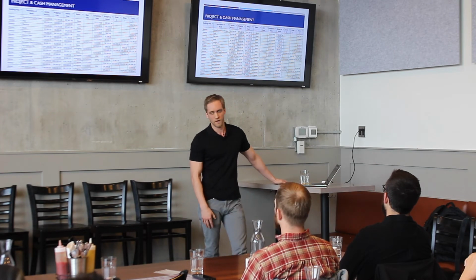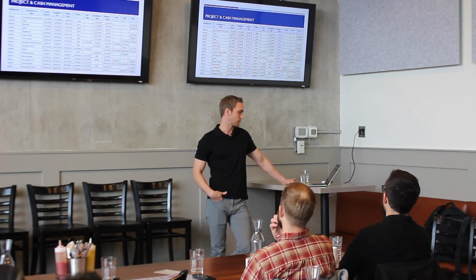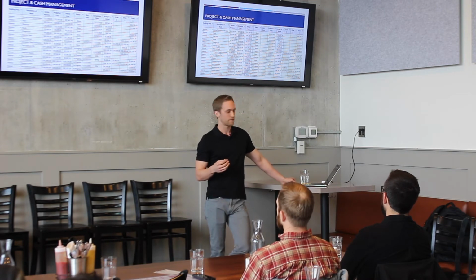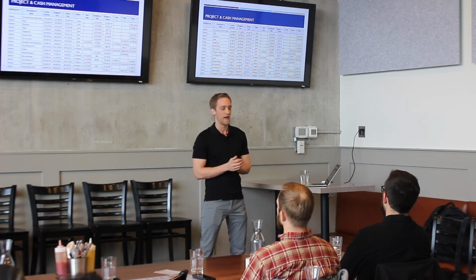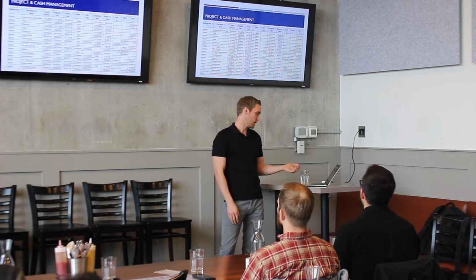Lender reserves. When we do a value add deal, we try to have the lender provide us as much as we can in terms of funding. So if they'll provide us with rehab, that's when you'll see those lender reserves. And the way it works is we pay for the expense up front. Example, we'll put in the playground, and then the lender will come out and inspect, and we will make a replacement reserve draw. And if their inspection goes well, they'll fund the money, but we need the capital up front to pay for these projects, which is called our working capital.